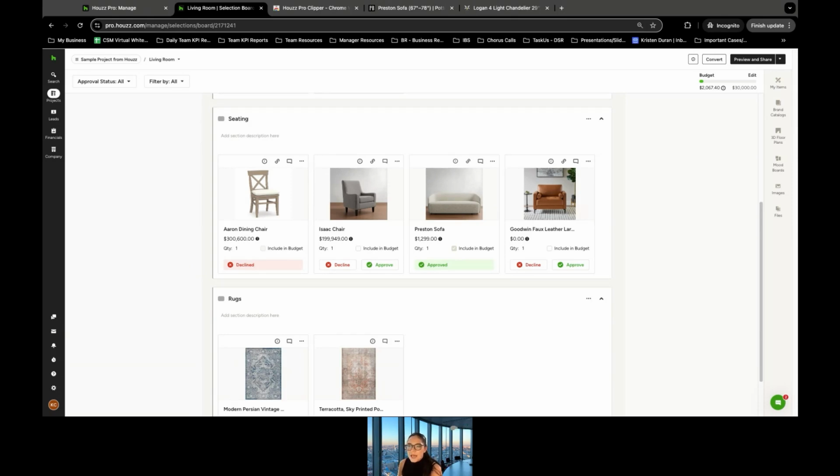If it already has something tied to it, that's something the client's seen, we wouldn't want to go and change it, and it'd be difficult to read into the estimate that way. From the selection board base, if it's already been associated with a sent estimate or approved estimate, especially, you wouldn't be able to go through. So we want to make sure we have that before the client approves it or before we convert it to an estimate.